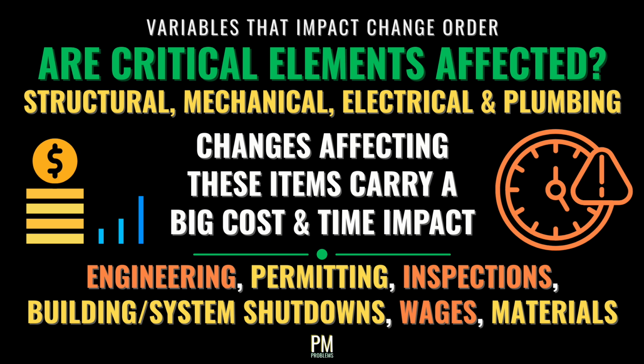Lastly, labor wages, equipment, and material for these types of work are always on the higher side of the cost spectrum too. In short, just keep in mind that changes associated with structural, mechanical, electrical, or plumbing systems are always costly, both in terms of dollars and in time.